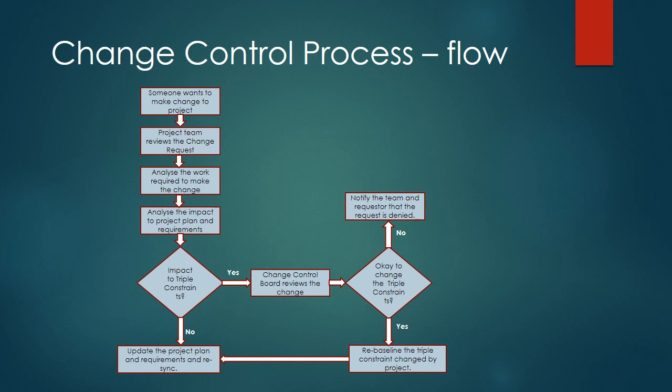Again, when we talk about changing the project plans and the scope, what we call is configuration management. If an approved change request affects the scope, then rebaselining the scope, or configuration management, is enforced. All project plan documents, WBS, activity list, network diagram, resources, all changes that are necessary will be done, and it's like a ripple effect to the project.